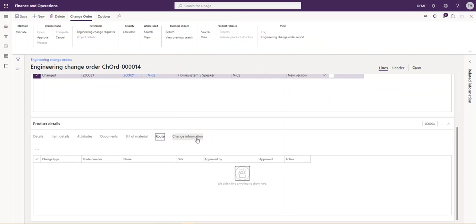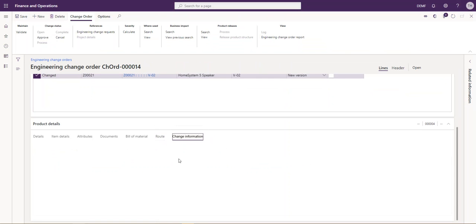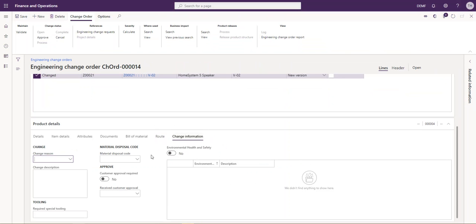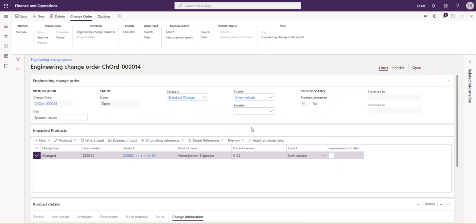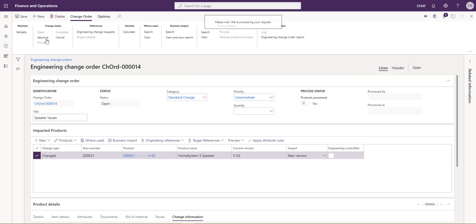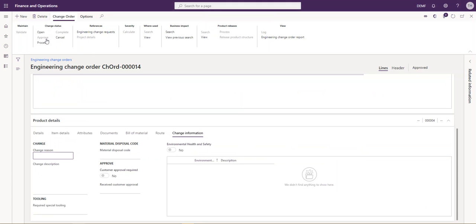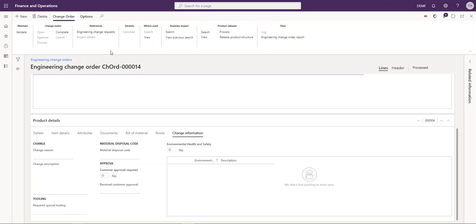We can also change the route, or there's potentially some change information that we'd like to add to it. At this time, this is all the information that we need for this change order to process it. We can set up a workflow to have different people approve and process these change orders. In this instance, I'm just going to do everything. So I approve and process. It's going to create my new versions of my bill of materials on my product, and I'm now completed.